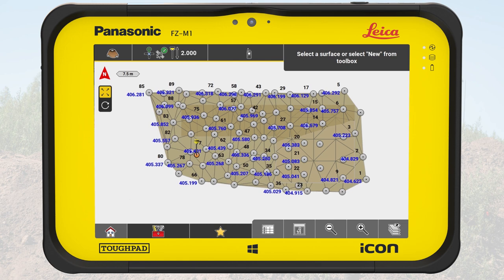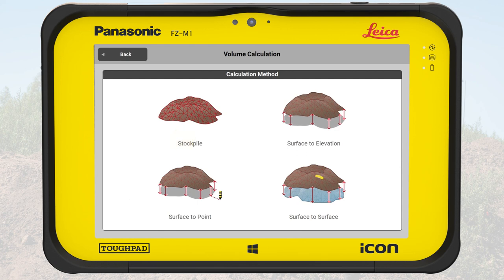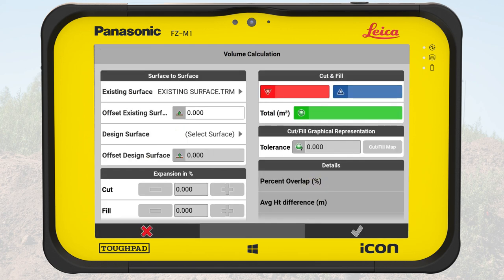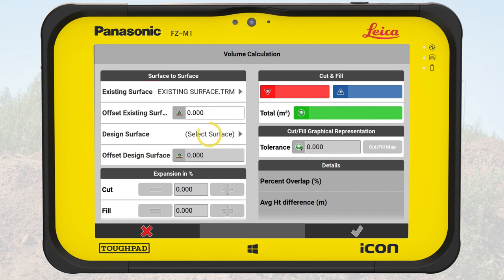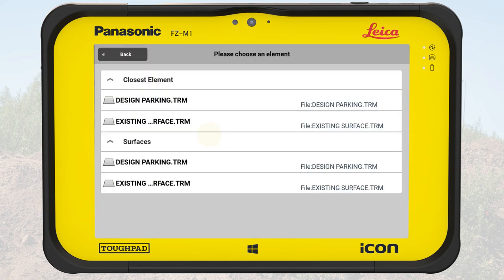To get an overview of the areas for cut and the areas for fill, we calculate the volume of the surface. We open the toolbox and select Calculate Volume. We select the method surface to surface. As an existing surface, the just measured surface is selected. As a design surface, we choose the imported design file.